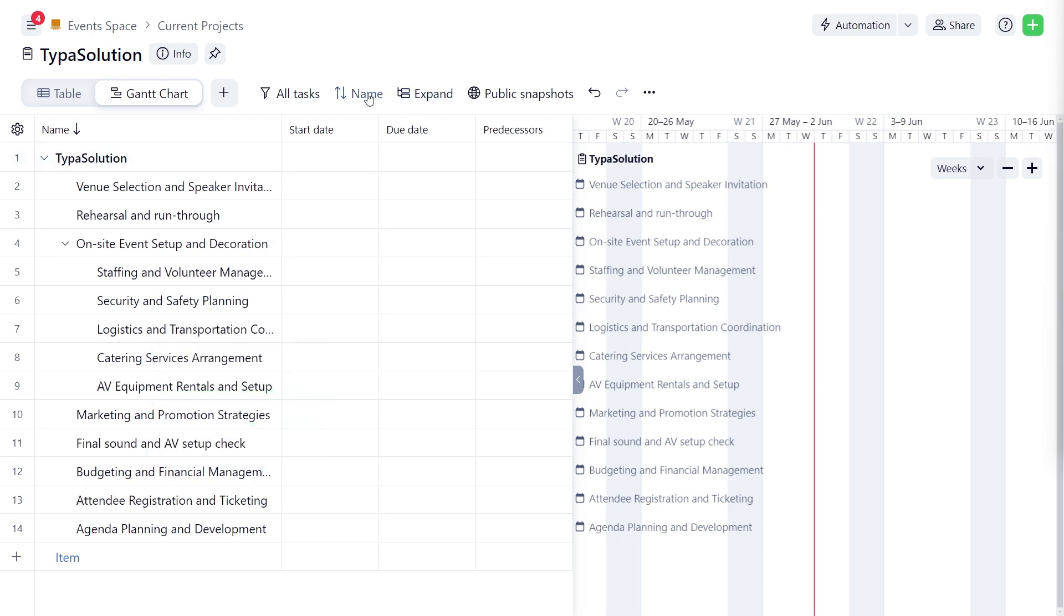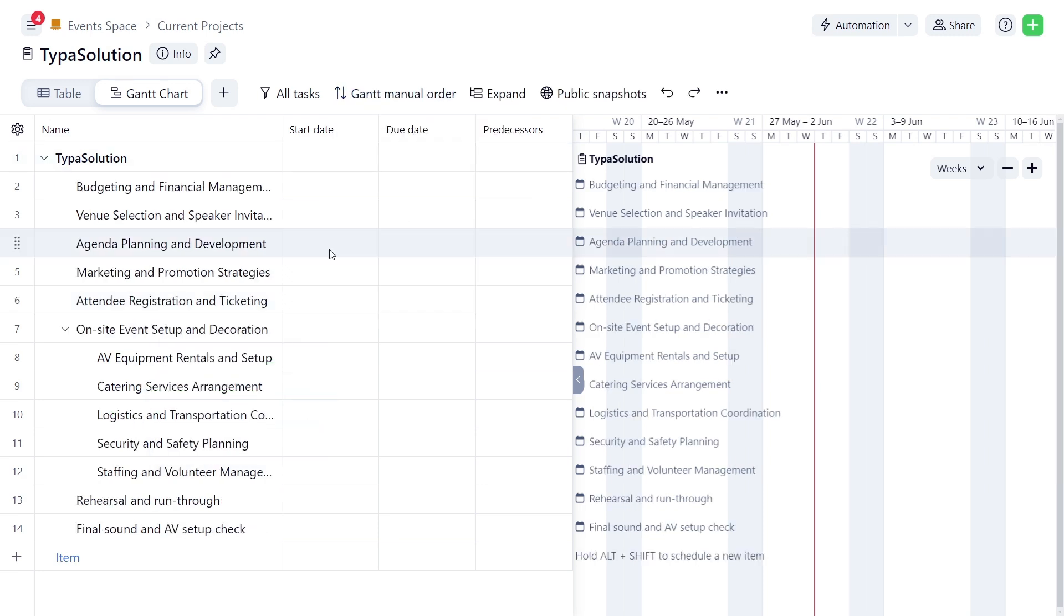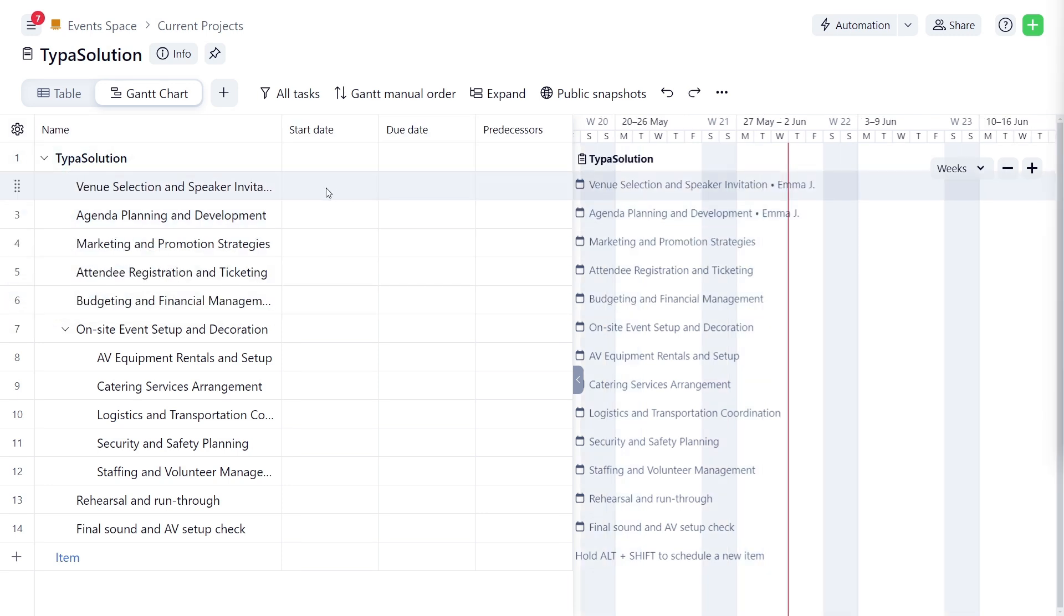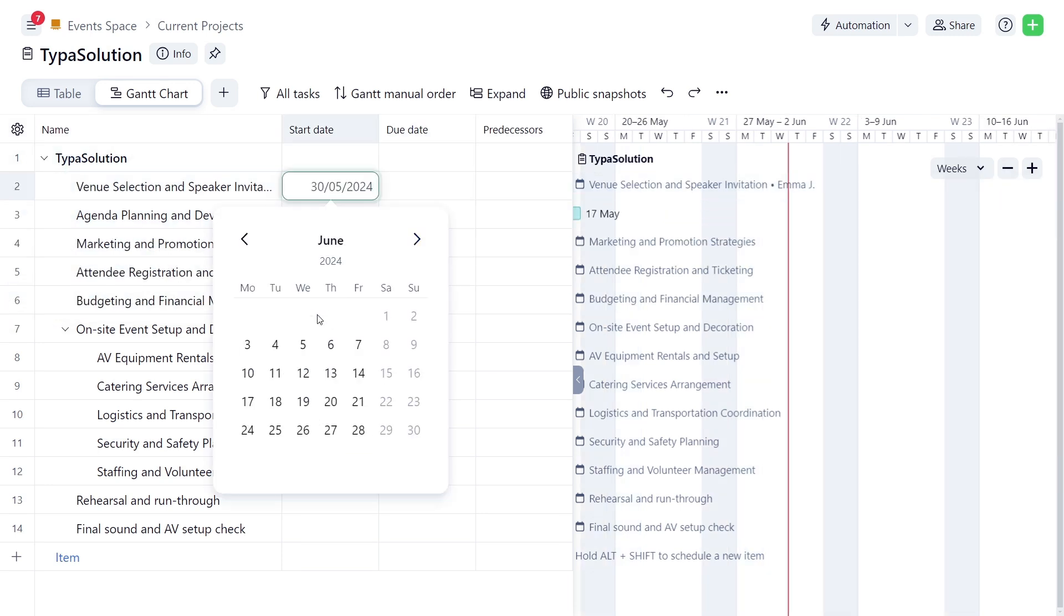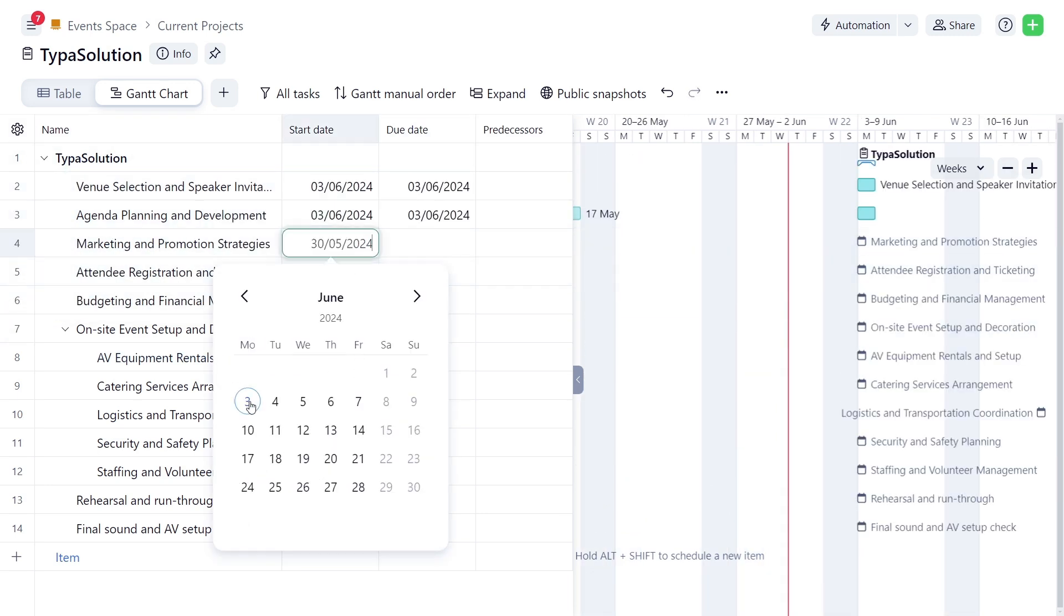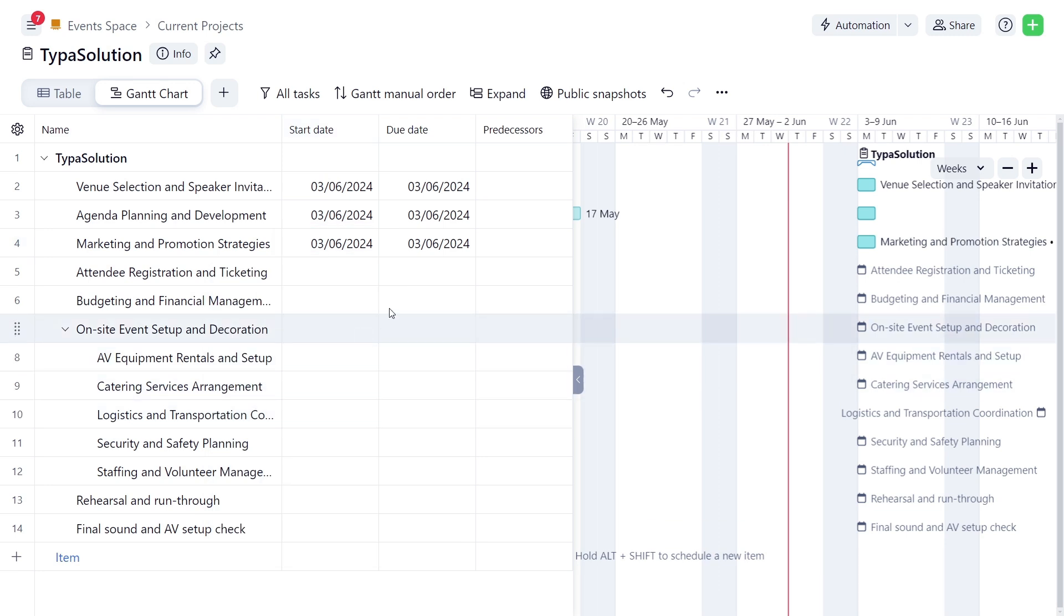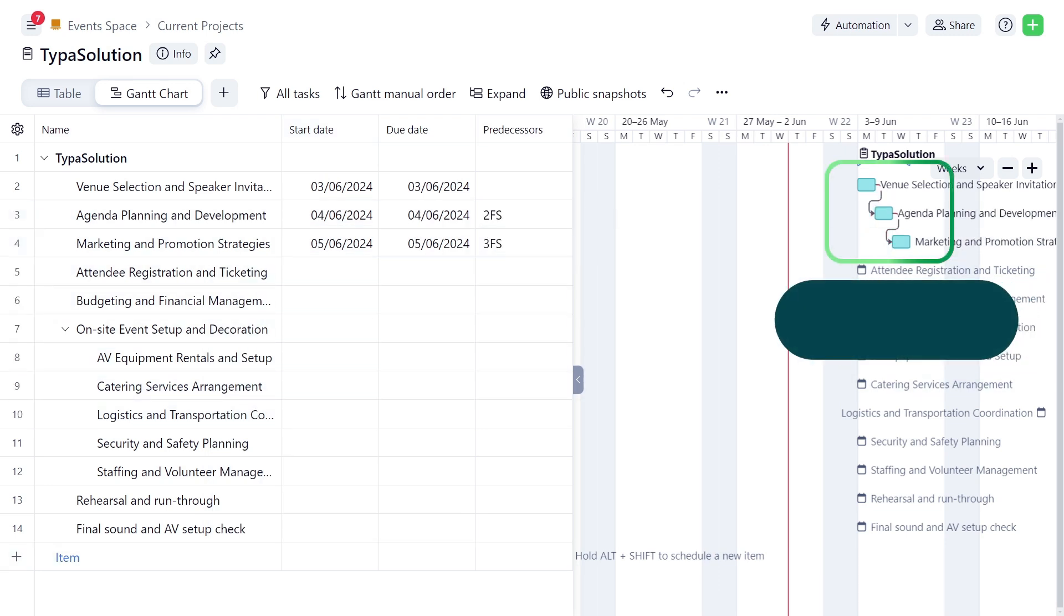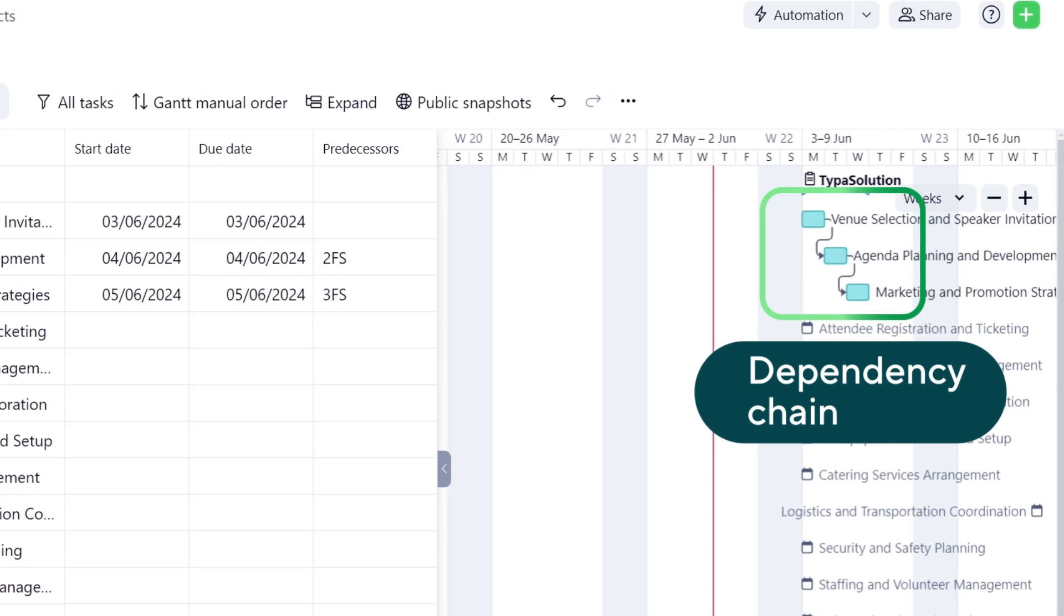Sarah uses the Gantt Manual Order sorting option to arrange them in the desired order. Then she adds the dates for the initial tasks and sets Finish to Start dependencies. This ensures that each task must be completed before the next one can begin. If the first task is delayed, it will also delay the following task.